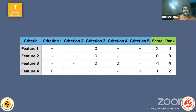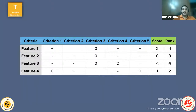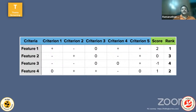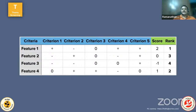Theme Screening follows a similar pattern to Scorecard but uses plus, minus, and zero instead of a 1–100 scale. Plus means an added advantage, minus means a disadvantage, and zero means neutral — neither agree nor disagree. Scores are tallied and features ranked accordingly. The primary difference from Scorecard is the simplified symbolic scoring rather than a numeric series.